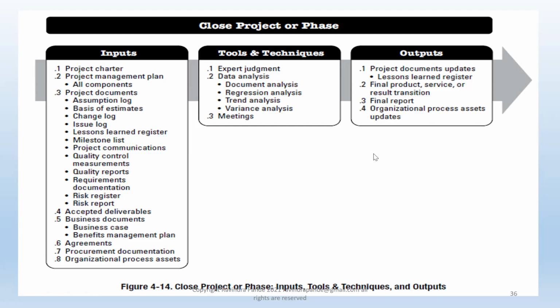As a project manager, we have to have sufficient lead time between procurement and delivery. But some of the procurement is perishable, like it goes bad in a couple of days, a couple of hours, a couple of weeks. Depending upon the perishability of a given procurement, we need to understand how these procurements were planned, why they were delayed, whether there are any challenges in putting up the request, or any challenge in the vendor delivering the entities, and so on and so forth. So all these things are analyzed.